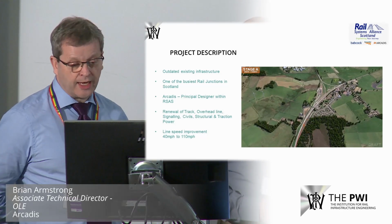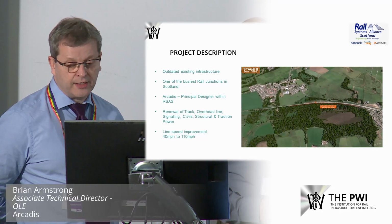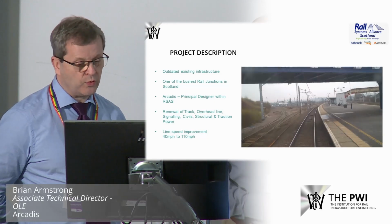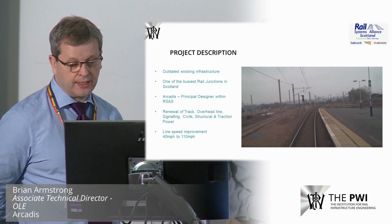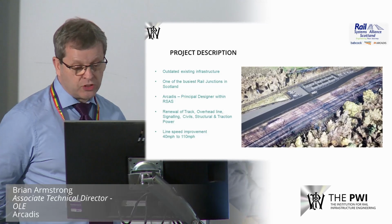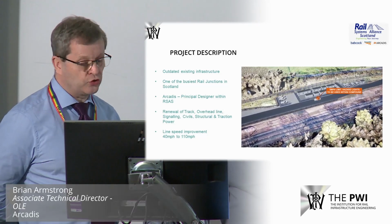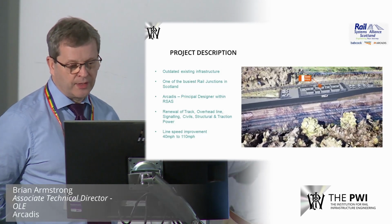The existing track and S&C assets are nearing the end of their serviceable life and are identified as requiring renewal, and this provides an opportunity to rationalise the current layout and assess the signalling requirements. An added benefit of this is the ability to assess the existing permissible speeds and turnouts for improvement, with the aim to remove or minimise existing track and signalling non-compliances, resulting in less restrictive junction controls for better drivability of a strategic area on the route.